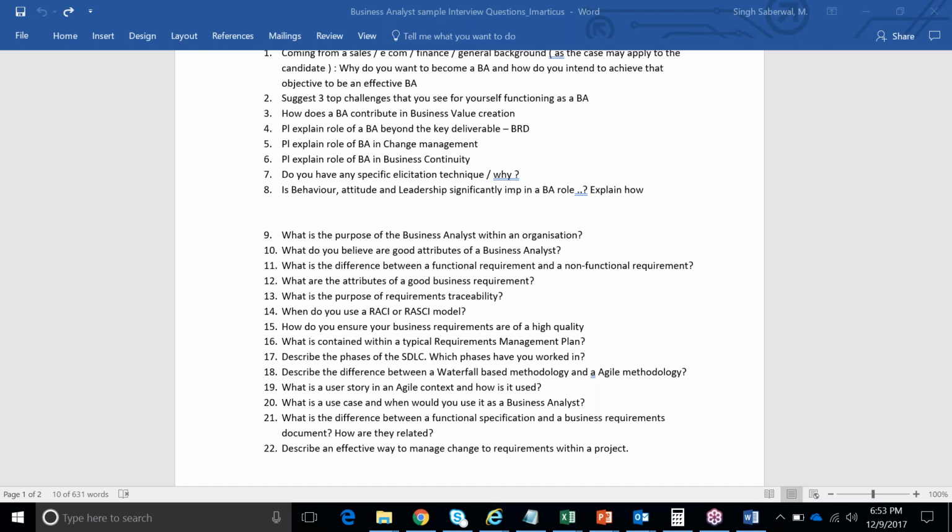So that they are able to validate and give you a go-ahead on that. The last one is informed, from I. What is informed? Informed is about some of the stakeholders who are not actively involved. Let's call them passive stakeholders. We just need to inform them. We don't have to consult them, we don't have to involve them in active discussions, but from an information point of view, it's like being in the CC of the email. They need to be in CC because they need to have a view on what is being developed and why. Okay, so that is the RACI model.